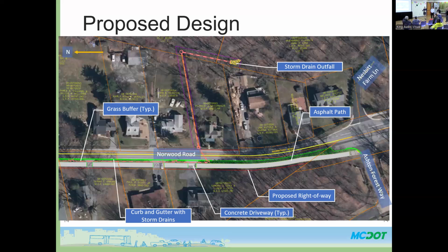Right, we've modified this design. What you're looking at is the 60% design stage, which is one of the milestone design stages. We put up our 35%, 60%, 90%, 100% design plans on the project website. We received the feedback from you, and we will address your concerns and comments in our next submission, which will be the 90% design stage.